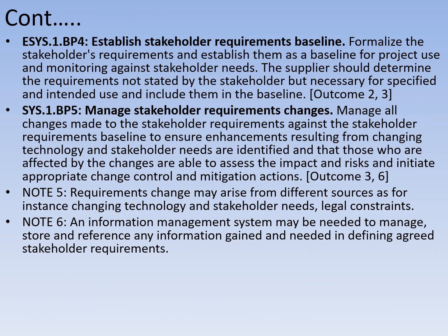Now, what is meant by base practice 4? Establish stakeholder requirements baseline. Formalize the stakeholders' requirements and establish them as a baseline for product use and monitoring against stakeholder needs. So this has to be formally agreed. Once you clearly, explicitly agree, it has to be formalized. There has to be a very formal legal document, a legal work product, which clearly ensures that you understand the stakeholder requirements baseline.